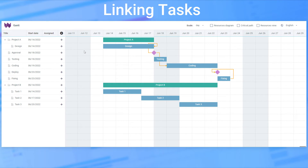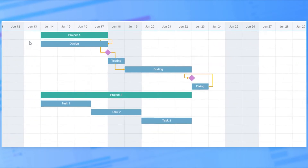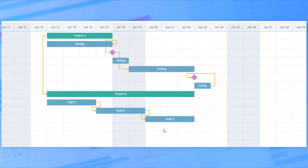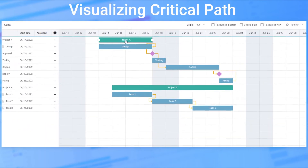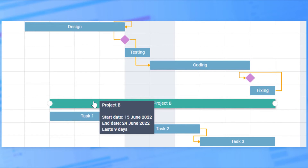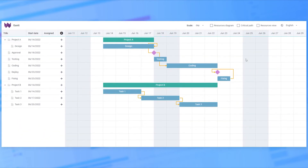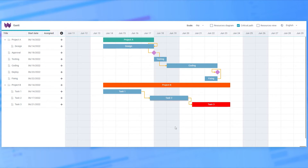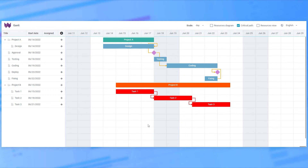The project may include a huge number of additional tasks, and each of these tasks may directly depend on the readiness of the other ones. To display such dependencies, the widget provides special lines that allow connecting interrelated tasks to each other. The project has to be done in a certain timeframe. For analyzing such deadlines, the widget provides a critical path method. It allows displaying the chain of tasks that you need to complete on time to meet the project deadline. The widget takes into account only tasks with end-to-start links. If the schedules of such tasks are overlapped or set without considering the lead time, the widget will consider them critical and highlight them in red.